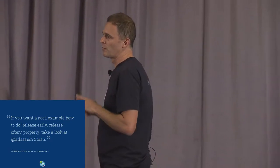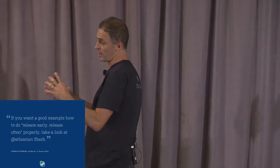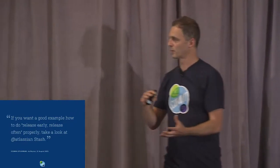We never drop our quality or scope for a particular feature either. We're always considering that we want to have a minimum feature set that we put out for any feature, that it's going to be this level of polish, so that people are going to really gel with that feature. So we never have to cut that back in order to fit it into a timeline. The timeline is fixed, but the feature set is flexible.